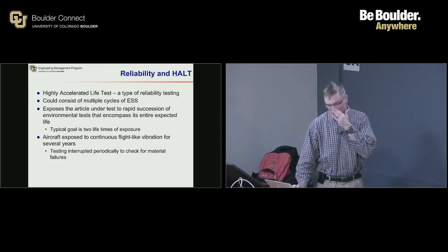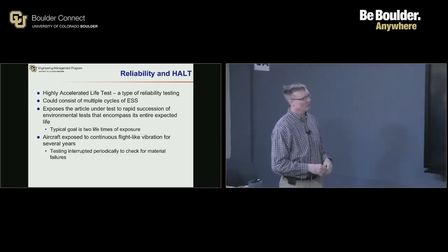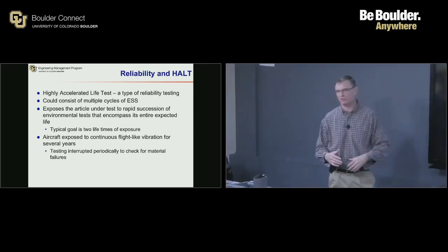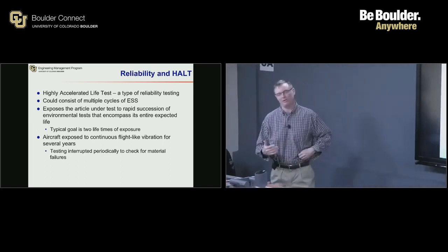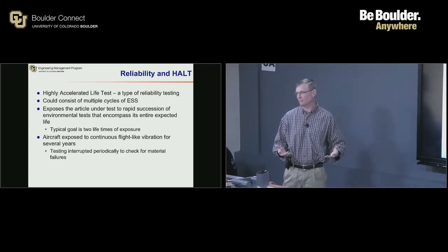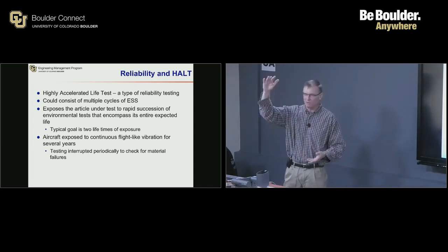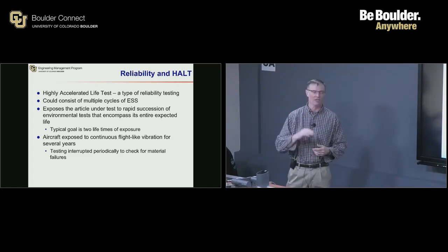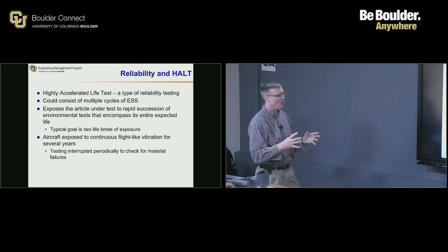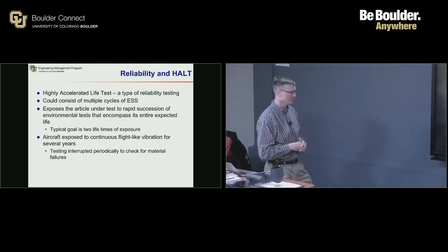All right, reliability or HALT testing. HALT is a type of reliability testing. So it could consist of multiple cycles of ESS. So just keep doing it. What you're trying to do with HALT is see what it takes to break the thing. I know we gave you the requirements, but now I want you to exceed the requirements in some incremental fashion until you find the breaking point. And what was it that broke? When it finally broke, what was the weak link? So that's what HALT's all about, finding the thing that's the weak link in the chain that's going to break first.